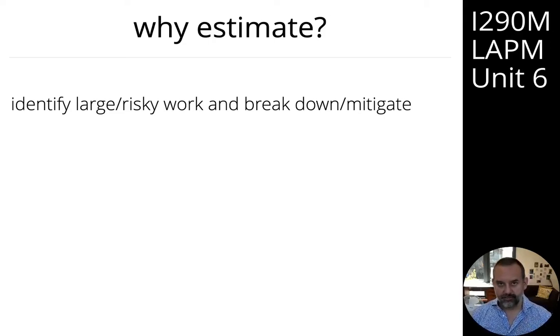This is really crucial. Evidence that has been gathered as part of a research program I work on shows that you want stories to be less than a week's worth of work. So when you're estimating, if it looks like that work is going to take more than a week, that means you need to break it into smaller chunks so that they're easier to complete and more predictable and more manageable for your team. Obviously, they should still follow the SMART principles that we discussed in previous units, but you want to make them 1, 2, 3 days work, not really more than that.